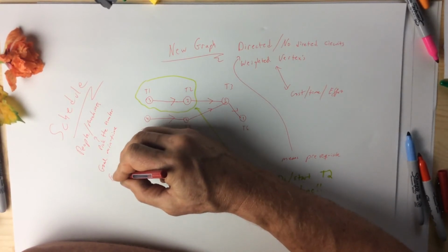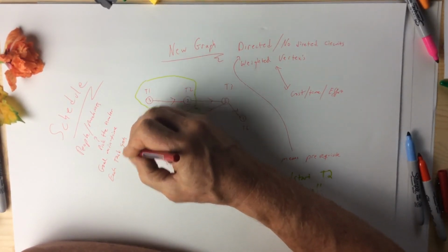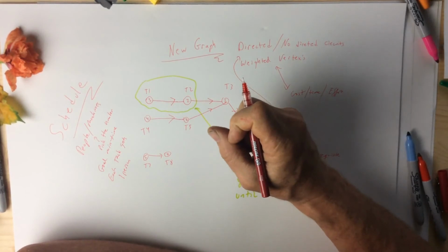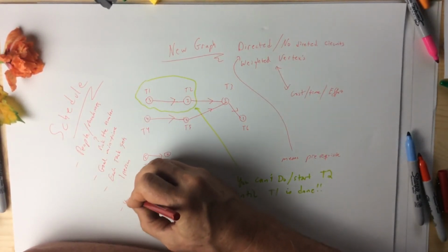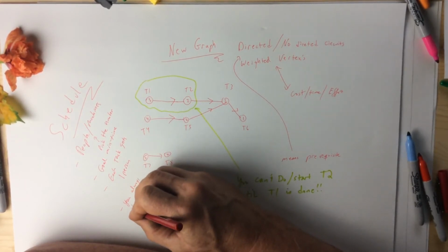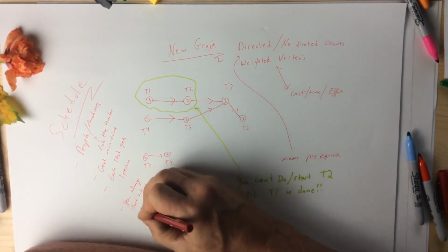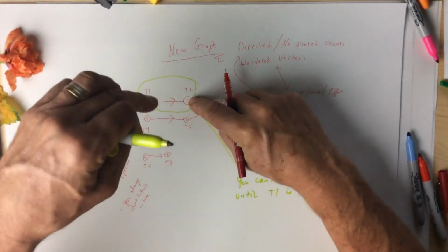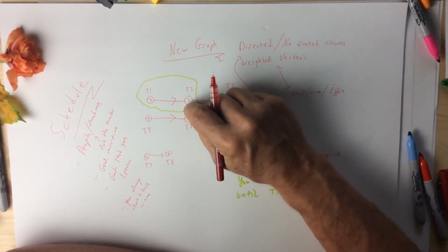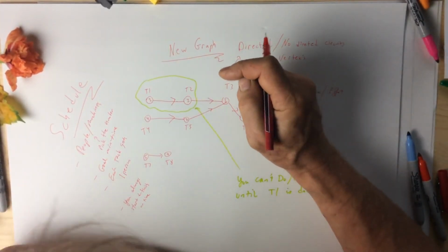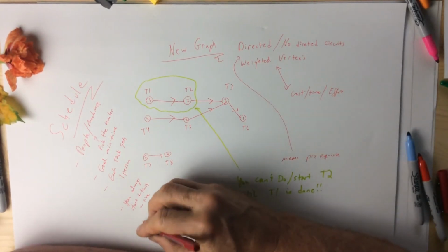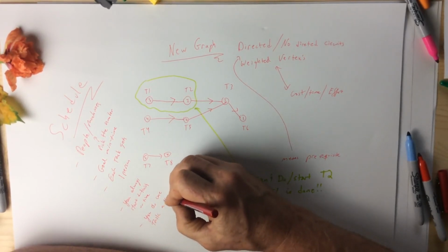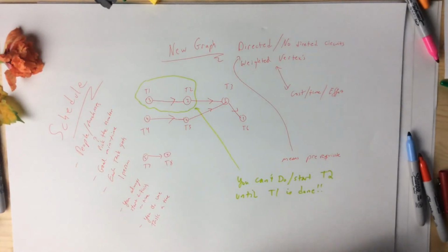The other thing is we can't put multiple people on a job. So each task gets one person. So if I put you on T1, I can't put anybody else on it. And now here's another thing. You always start and finish on time. So if I say you're going to start job T2 after Helen finishes T1 at 3 o'clock, you will start at 3 o'clock and you will finish at 5 because it takes exactly 2 hours. No worries about that. Also, you do one task at a time. You can't split your work. So those are a couple of assumptions.